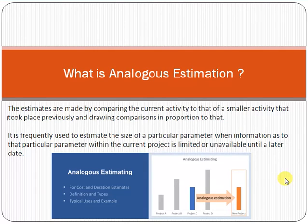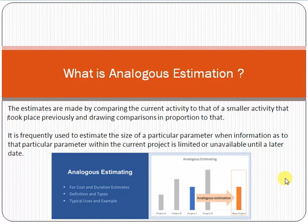The basis of that estimation is: first, historical data — the older project was done in five months with five thousand dollars. Second, the new project is approximately 20 percent more complex. Third, domain experts with expertise in e-commerce confirm that complexity. After discussion with technical leads, you decide the project will take six months and cost six thousand dollars.